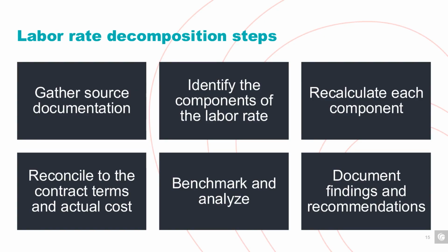Payroll taxes. You're going to look at any federal and statutory rates, and you're going to compare those to what's being proposed and verify they're calculated correctly. Here it's important to understand the annual caps on these taxes, as they're often not accounted for properly in base wages. Then there are things like workers' compensation or general liability insurance that may be included in the rates. You'll want to look at the contractor's actual premium for these rates.